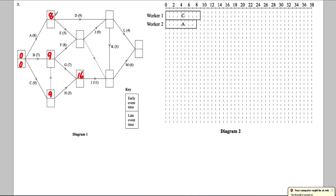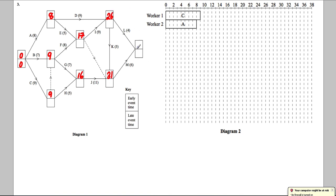How could we get to the next node? It's 9 + 5 = 14, or 9 + 7 = 16, so 16 is the biggest. For the next node, it's either 8 + 5 = 13 or 9 + 8 = 17, so we write 17. Then either 8 + 9 = 17 or 17 + 9 = 26, so 26 is biggest. The next node: 26 + 5 = 31, 17 + 0 = 17, 16 + 11 = 27, so 31 is biggest.